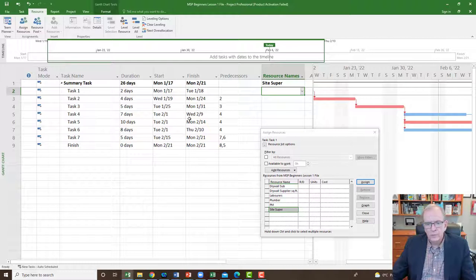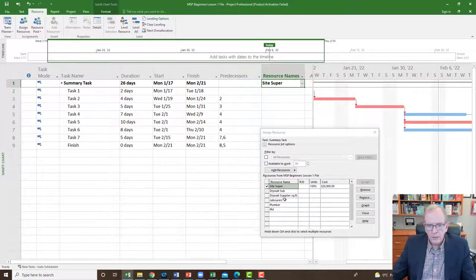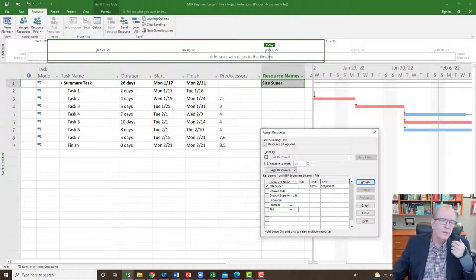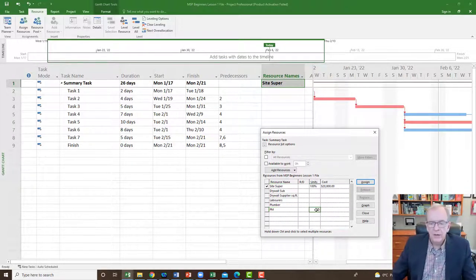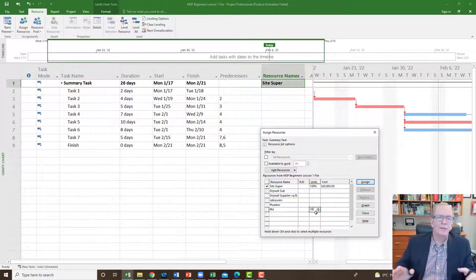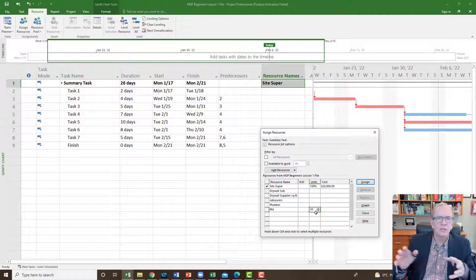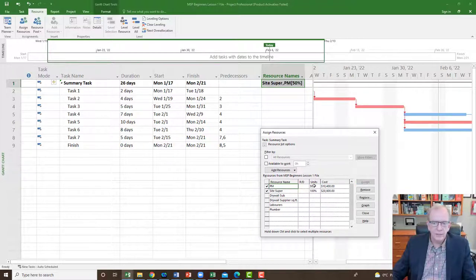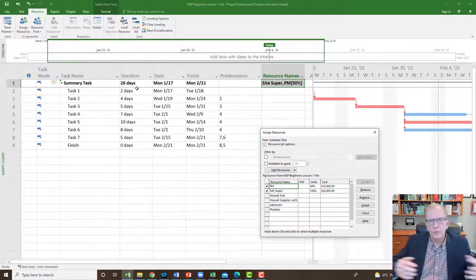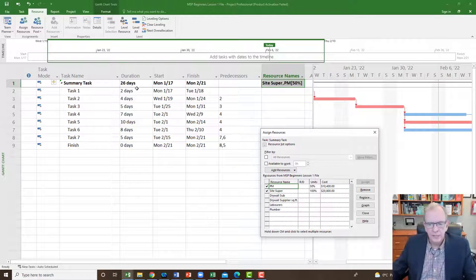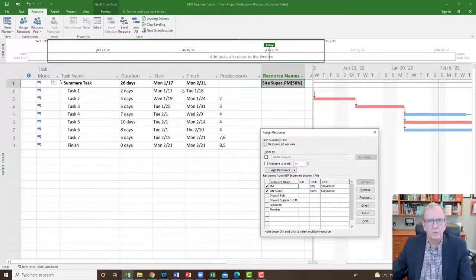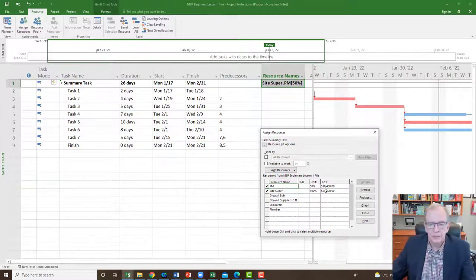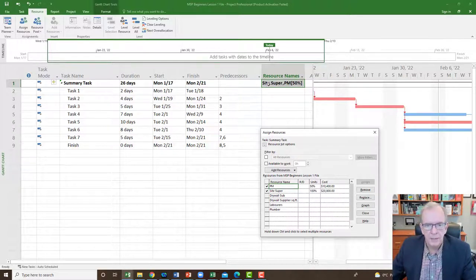Now let's apply the PM at 50% — they'll be there half the time, maybe working on other projects. So I'll type 50% and assign them. That's why it's half as much — essentially 13 days' worth. This happens all the time in every industry, especially with smaller projects. The allocation could be 30% or 20% depending on what you've budgeted and how much time is expected.